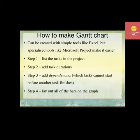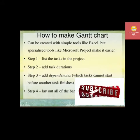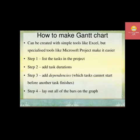A Gantt chart can be created with simple tools like Excel, but specialized tools like Microsoft Project make it easier. There are various steps: first, list the tasks in the project; then add task durations; then add dependencies; then lay out all the bars on the graph.